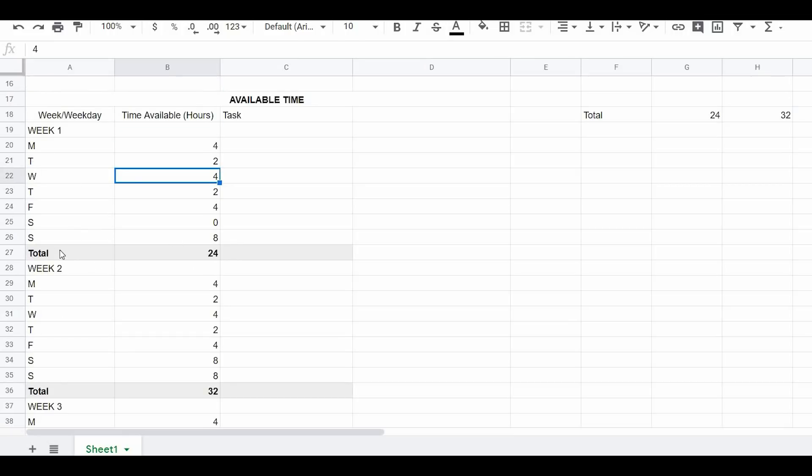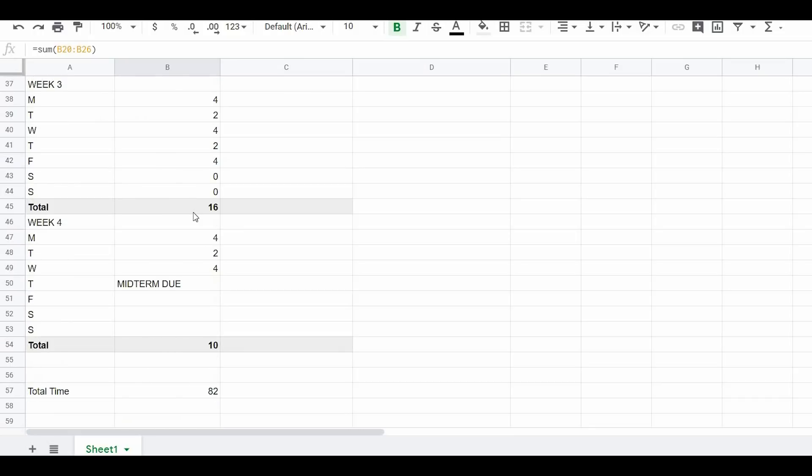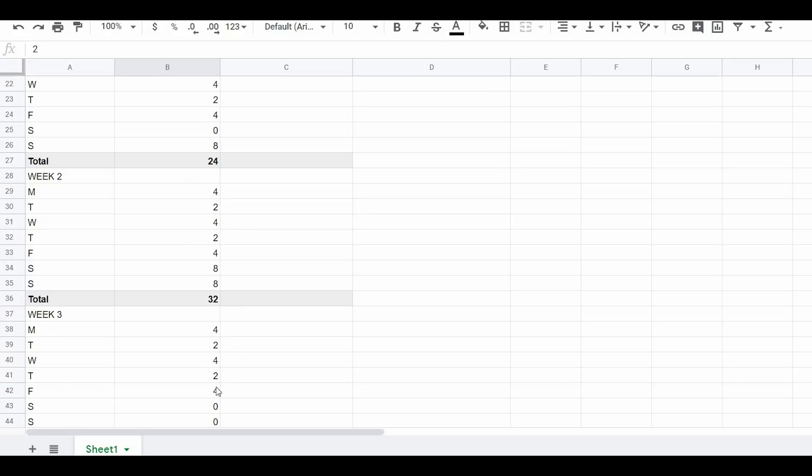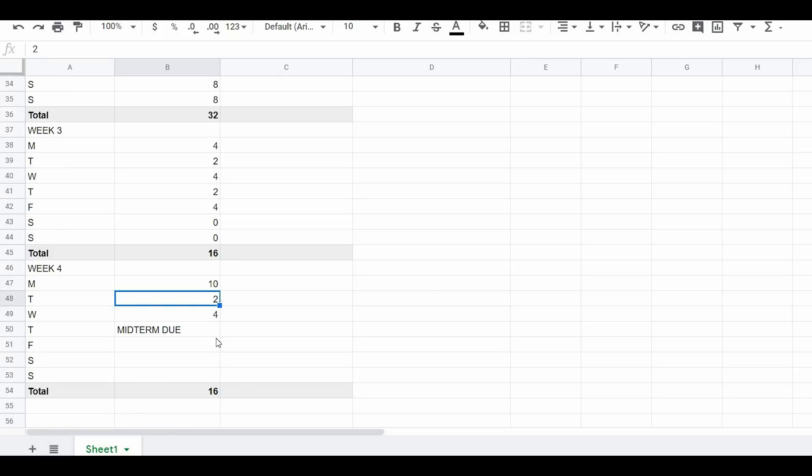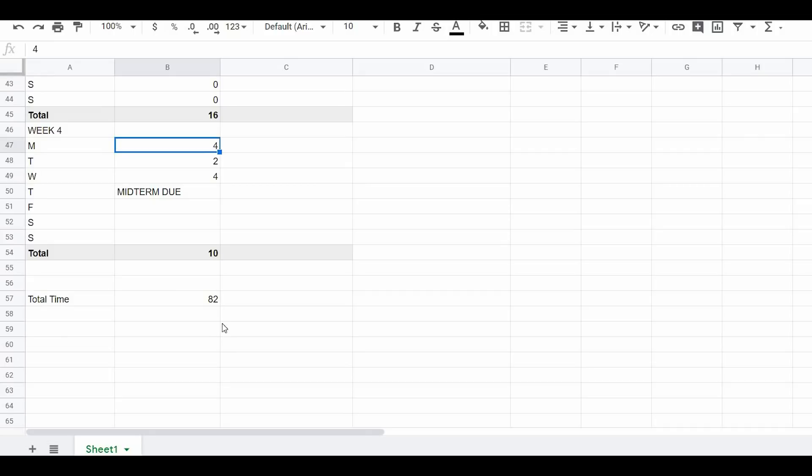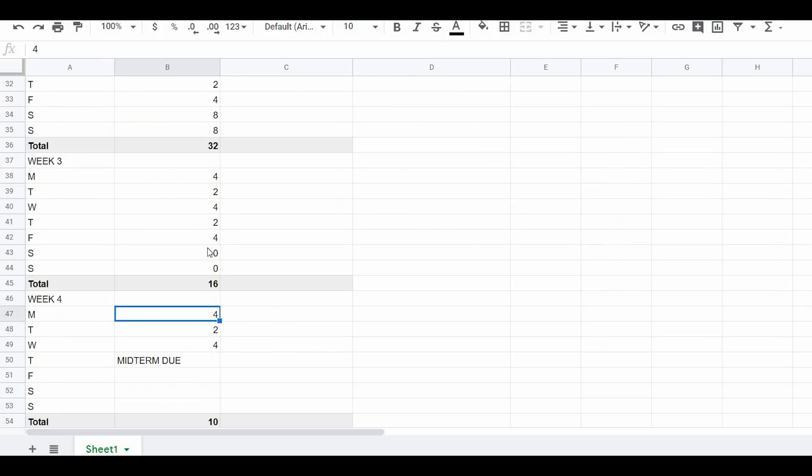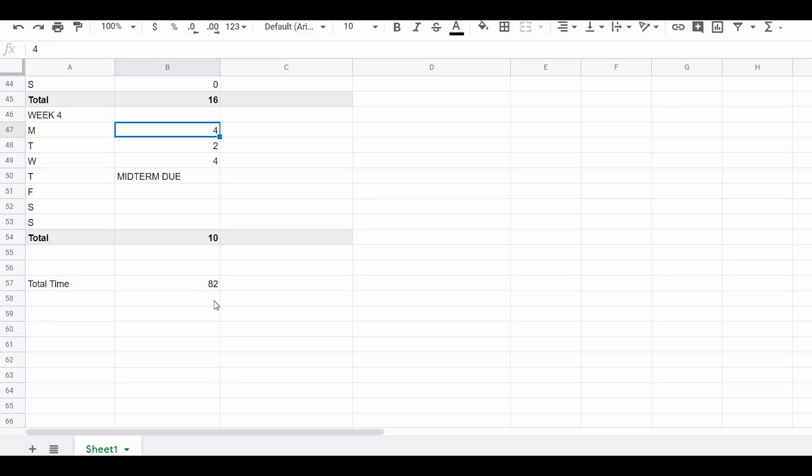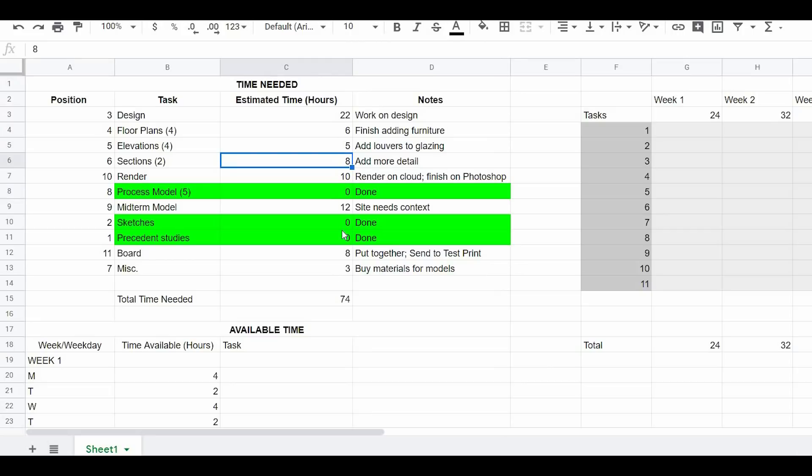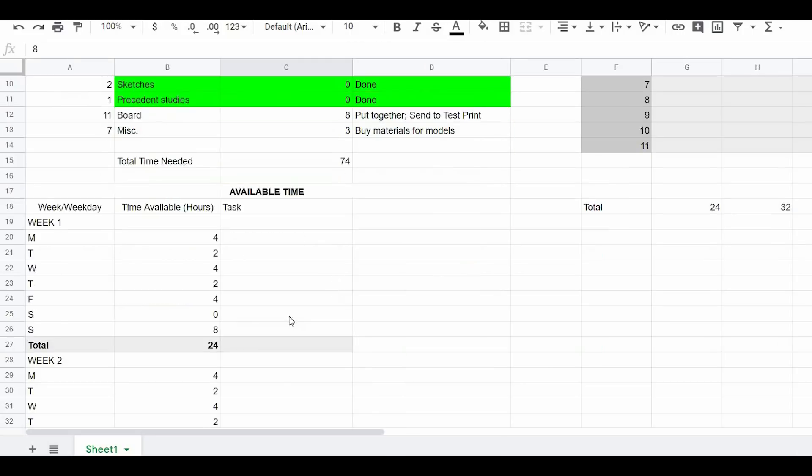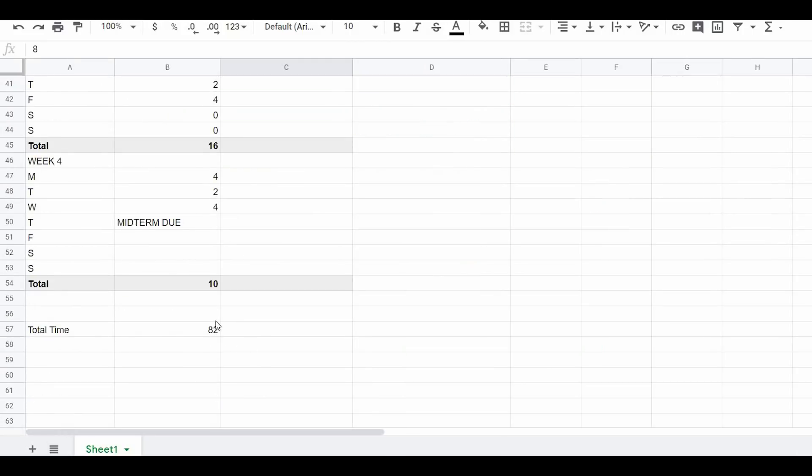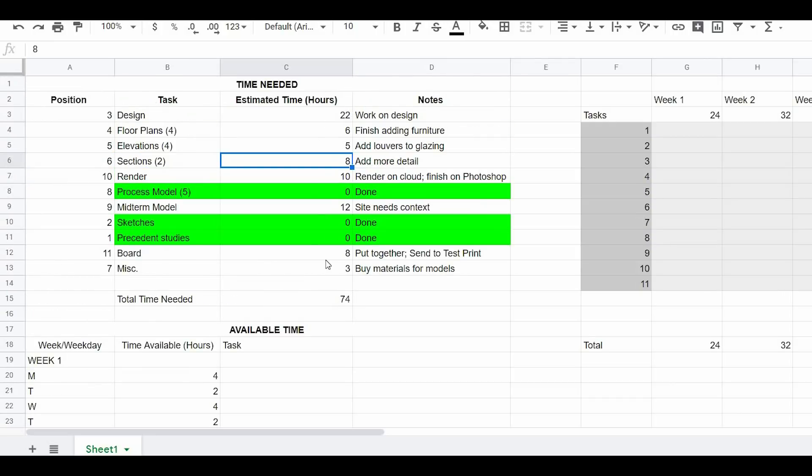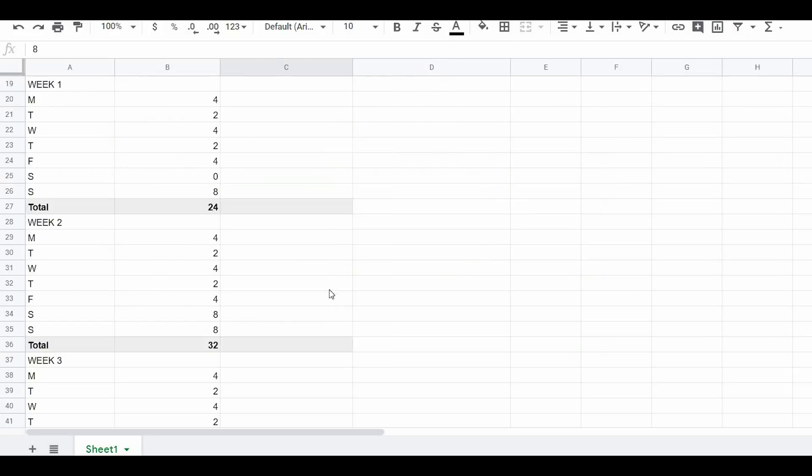That's basically the way you want to think about how much time do I need versus how much time do I have. So under this table, we're going to find that we have our weekdays and our available time, and it's going to work by week one, week two, week three, and week four. And we notice that our midterm is going to be due in four weeks on a Thursday. So what we want to do in this part is start to calculate how much available time we're going to be able to dedicate to our project. Let's say on Monday, I have school, and that day, I can only work from 6pm to 10pm. So I only have four hours that day.